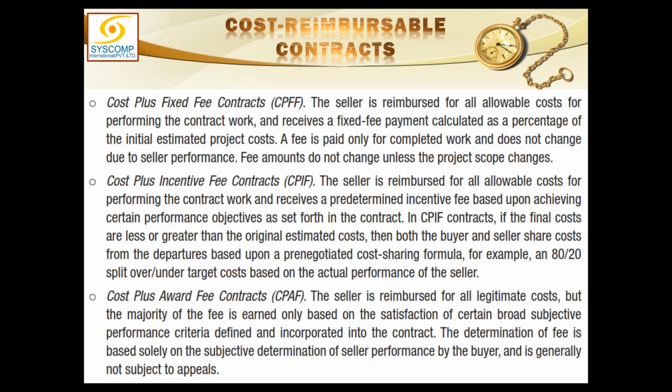But for the job done by the contractor of coordinating the work of the contract, he would be paid a fixed agreed amount at the end of the day. So what are we paying him? The cost is reimbursed for all the materials, and a fixed fee is already agreed in the contract, which is to be paid to the contractor for his services.